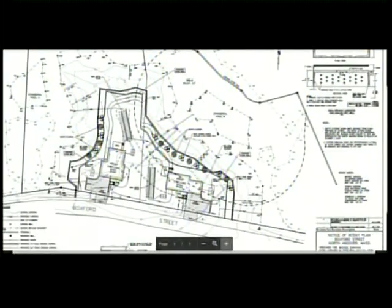As requested, the driveway is now out of the 50-foot no-build zone. The septic systems are all now out of the 75-foot no-build zone to the ephemeral pool. There is a wall that largely conforms to the 50 where possible. On the side where ephemeral pool A was not found to contain vernal pool species, the wall is somewhat closer. The mitigation plantings are in areas that are previously developed.